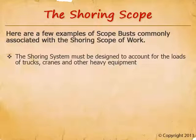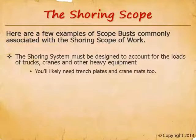We usually need to upsize the shoring system along the trucking lane and where heavy equipment will be placed. You'll likely need trench plates and crane mats to disperse the point loads from truck tires, crane outriggers, and other items — and the rental for these seemingly plain items can actually be very expensive. When shoring engineers account for live loads, they still routinely require that point loads be dispersed with these items. We need the trench plates and crane mats either included in the bid instructions to the subcontractors or as part of the general contractor's estimate for self-performed work. Just make sure they're covered.